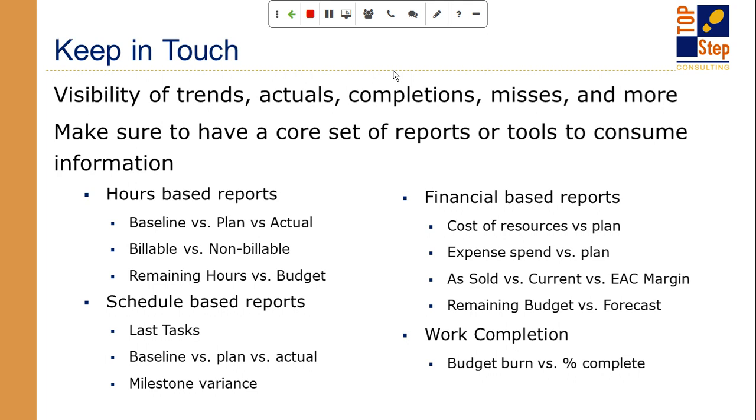So these financial-based reports are good ways to actually keep track of the performance of the project. You could be on track and hit all of the hours, but if you spent money on, sort of, the top dog, you probably didn't make your margin. So these three things work together as far as keeping the project as you scoped it on track.